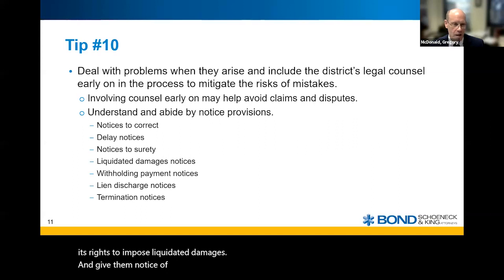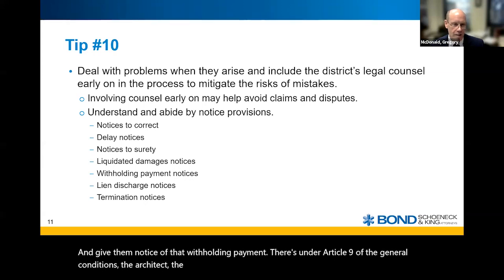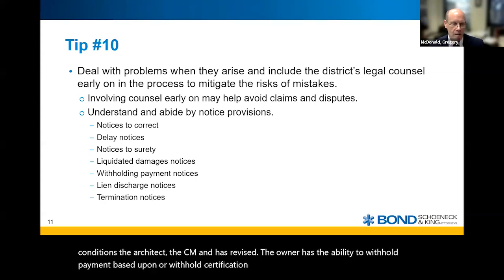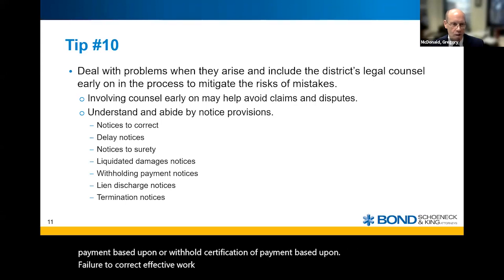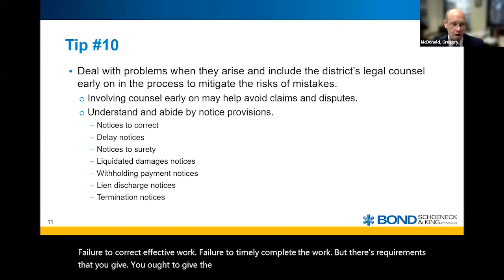Withholding payment, there's, under Article 9 of the general conditions, the architect, the CM, and as revised, the owner has the ability to withhold payment, or withhold certification of payment, based upon failure to correct defective work, failure to timely complete the work. But there's requirements that you've got to give the contractor notice of that withholding.